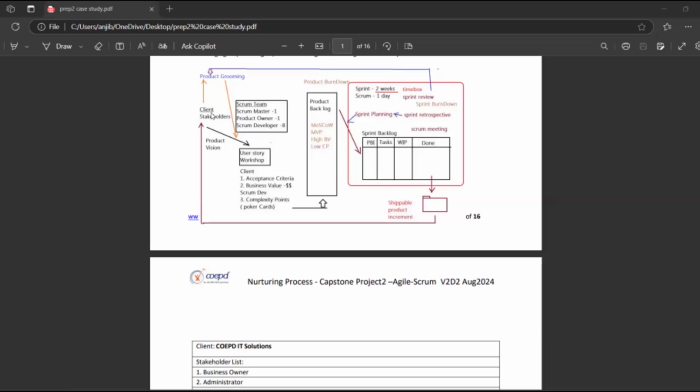After conducting the meeting with the stakeholders, after gathering the lack of requirements, the lack of information for the requirements, again we can take up user story creation. After user story creation, we can drag that into the product backlog again. After that, the refinement process is the same. Once we have gathered the missing requirements for that user story, the process will be the same and repeated, as we conducted at the starting of this project.